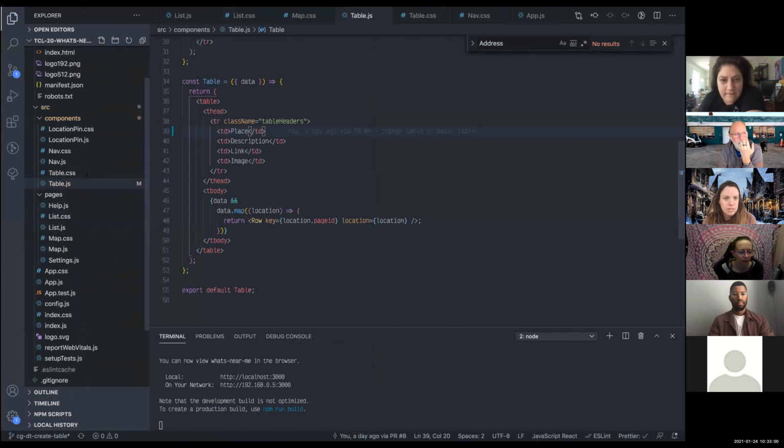In Kanban, the way we go about it is we try to right size stories. So if it's 3 days or whatever the range is, if all the stories are around that size, it starts to get predictable as well. Like we're finishing 5 stories a week. And so then we can predict, based on how many stories are in the backlog, when we're going to be done. So slightly different ways of going about it, but they have the same goal of making the work more predictable, which helps the business do planning and resourcing, all kind of stuff.